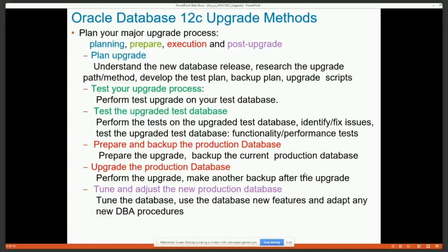So it's important to have a test plan to test your upgrade first. And of course, you also need to have a backup plan. If the upgrade doesn't go through, you need to have a way to downgrade, or you need to have a database backup somewhere you can restore. That is very critical. And possibly you need to prepare some scripts. So that's the planning phase.